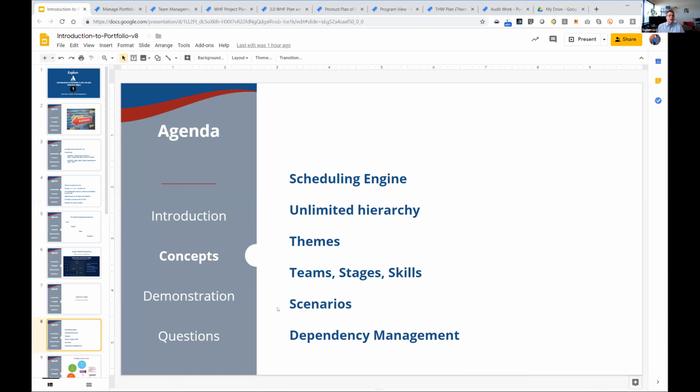We also have this idea of skills, and skills in version 2.x are attributed to the individual, and skills currently, as it's being contemplated in 3.x, are actually kind of being considered to be attributed to a team. So it'll be interesting to see where skills go, but they're certainly not breaking any of the extensive implementation of skills that we have in our customer base. Skills can provide a great visualization into capacity planning. So if capacity planning and understanding a limited resource within your delivery chain, that can be very powerful.